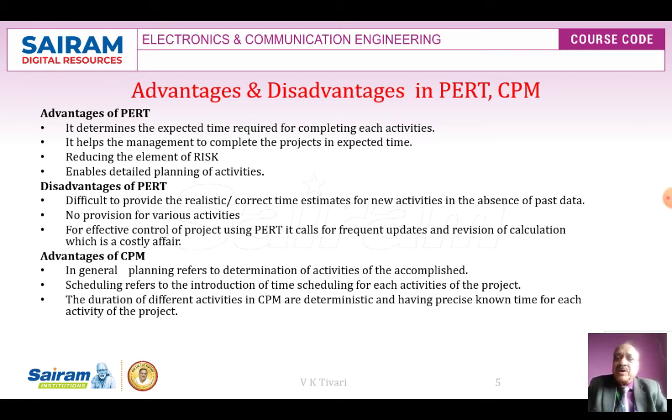Disadvantages of PERT: it is difficult to provide realistic and correct time estimates for new activities in the absence of past data. There is no provision for various activities. Effective control of a project using PERT calls for frequent update and revision of calculations, which is a costly affair.